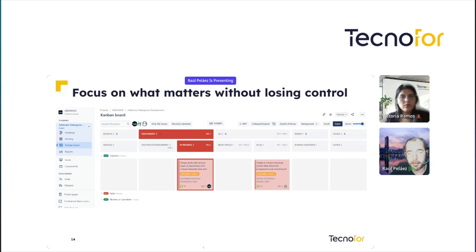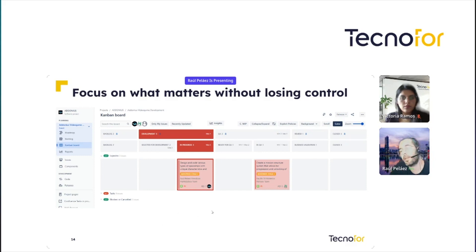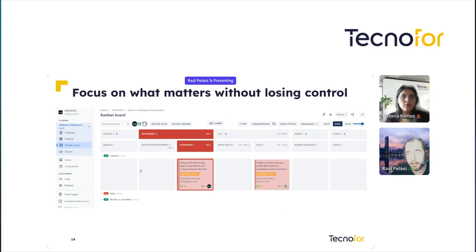As you see, we are using swim lanes here. We can collapse these swim lanes and also add a limit to them. Usually, the most important tasks — the expedite items — are in the first swim lane, and you can focus in an easy way on what matters. These tickets at the top are the most important ones.